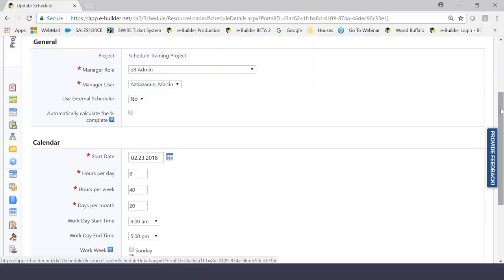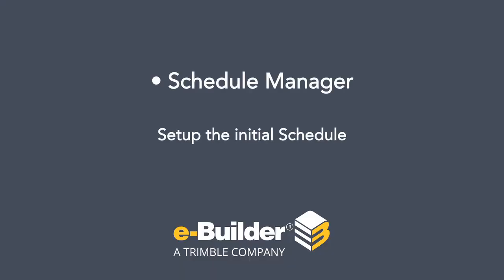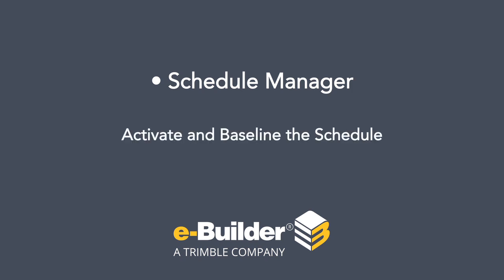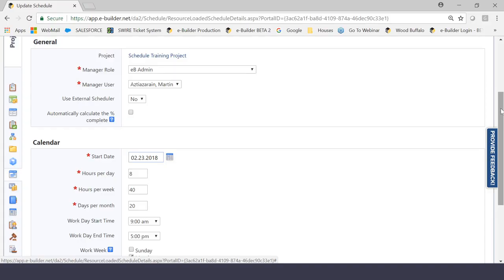So what are those things that I'm speaking of? First, this person is going to set up the initial schedule. They are the one that's going to draft the schedule, which I will show you in a little bit later in this video. And they are the person that's going to activate and baseline the schedule, hence making it available for the project at hand.